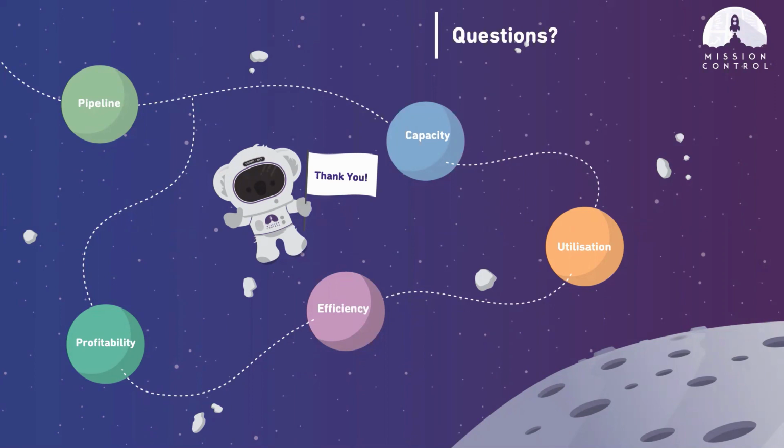Okay, just had another question there. So does everyone have access to the timesheets, and can you set up who approves the timesheets? So basically anyone that has a mission control license will be able to have access to the timesheet. And you have the options of who approves time. So you can choose between the project owner and the person's individual line manager as well. So you can have both people approve it, or either one of them, and obviously the option of having neither, and it just defaults to approved.